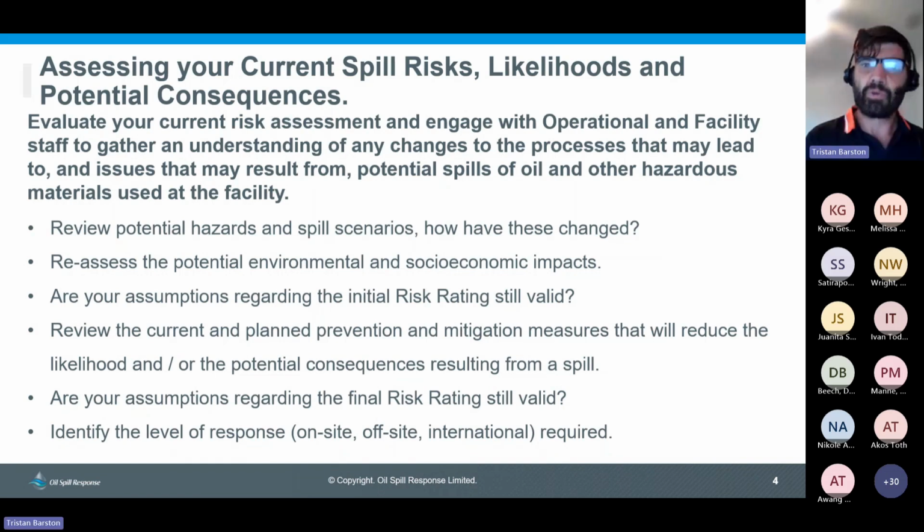If our initial All Spill Response organization, for example, is already engaged on another response, if our security level in the area that we operate changes, if it's now unsafe for us to go to a particular location, what are we going to do instead? And that's one of the key elements of the planning. We look at, if our initial assumption is unachievable, what are we going to do instead?